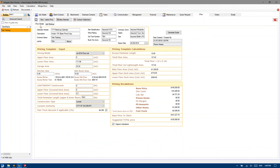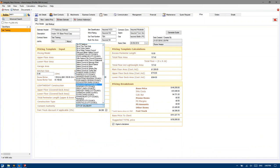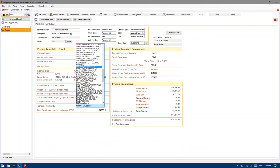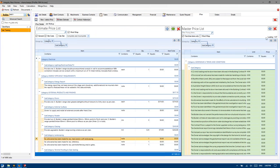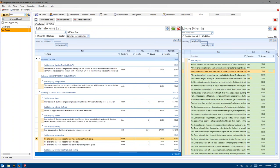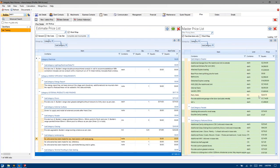So if I just jump back here and change this to, say, Gunnedah which has a much higher rating, you'll see it's changed to 1.07. So it's now applying a 7% additional loading to each and every single one of these items, which is why you're starting to see things like 2.35.40. So it displays that price increase on screen.